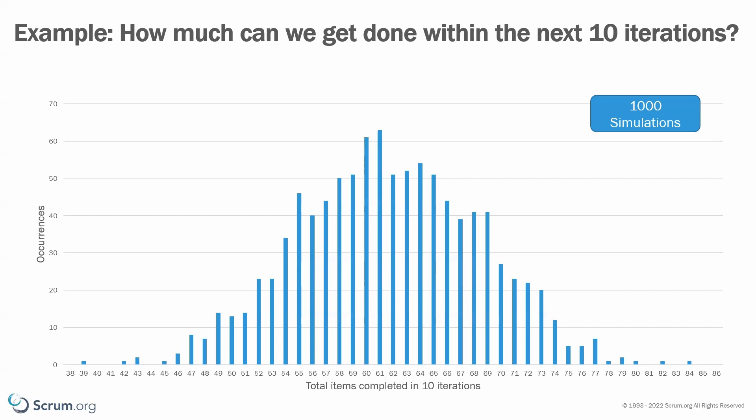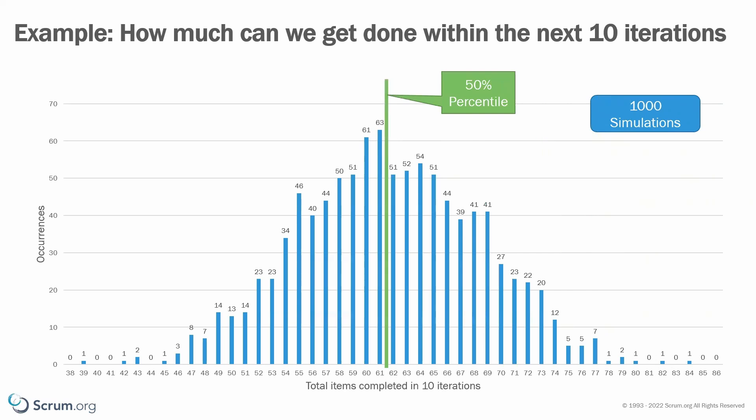Let's find out how many items we might complete with a probability of 50%. To extract this information, we have to find the point in the chart where at least 50% of our simulations ended with that result. With 1,000 simulations, 50% will be 500. We start from the right and accumulate the occurrences until we reach 500. The point on the x-axis where we stop we can read as: there is a 50% chance that we might complete at least that number of items within ten iterations — in our example, this is 62 items.